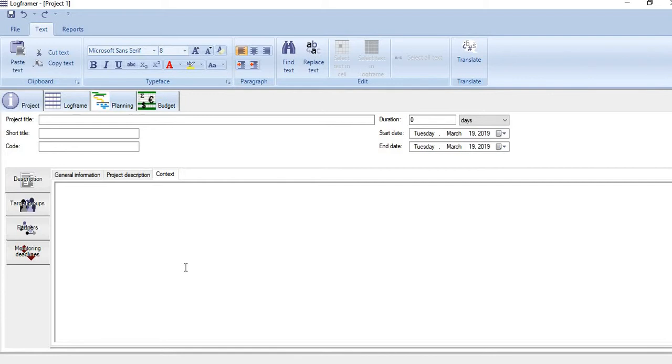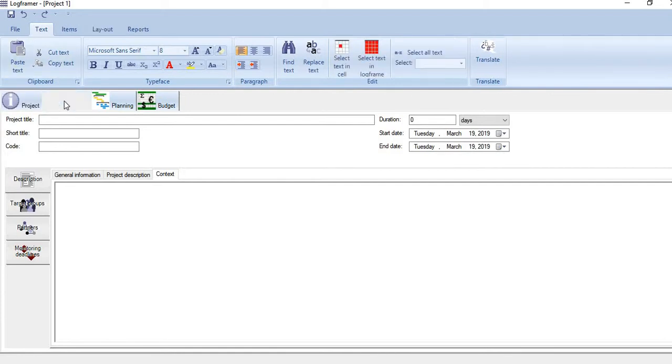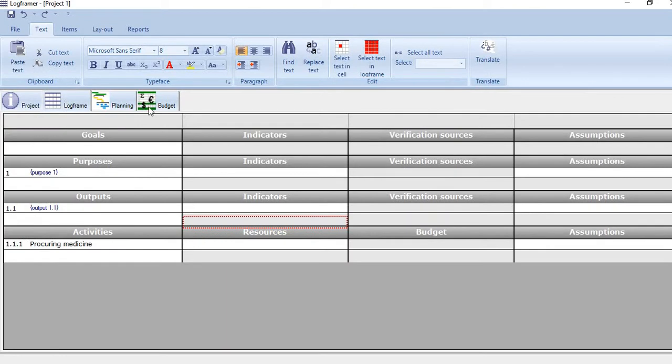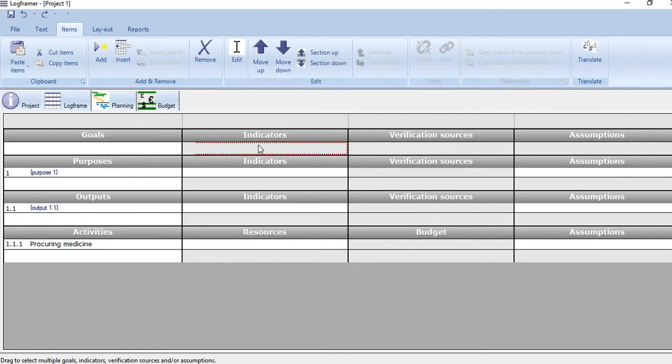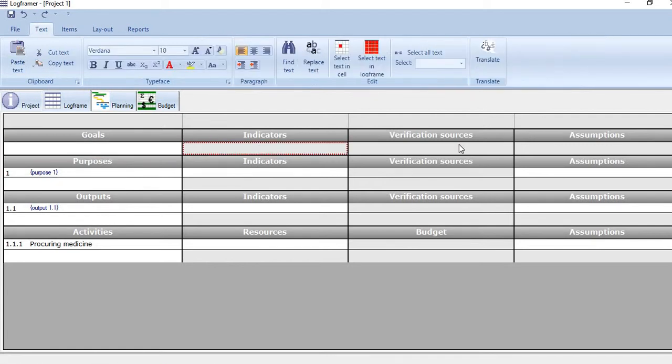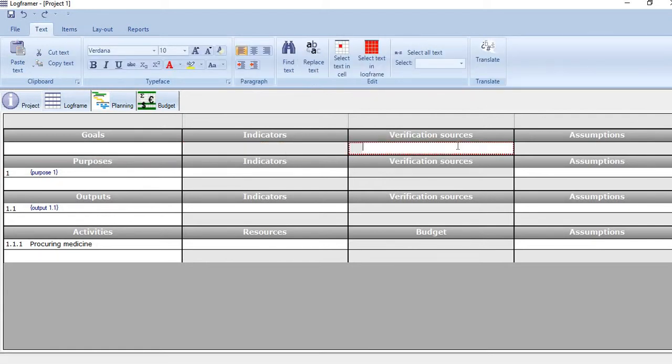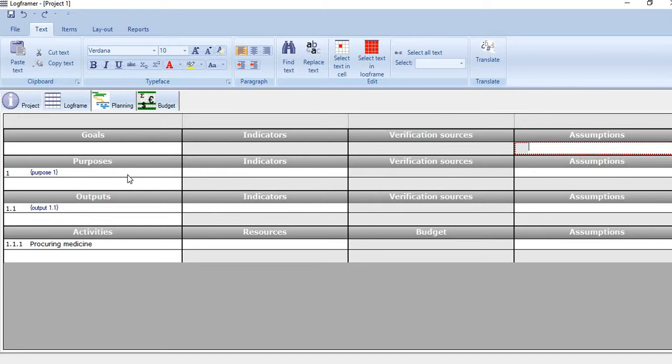Once you have done that, you move to the second component, which is Logframe. You see this is a logframe. Goals of the project are mentioned here with indicators here, verification sources mentioned here, and assumptions mentioned here. Same is the case with Purpose and then Output. For Activities, you can list as many activities as you want. Same is the case with Output, Purpose, and Goal.